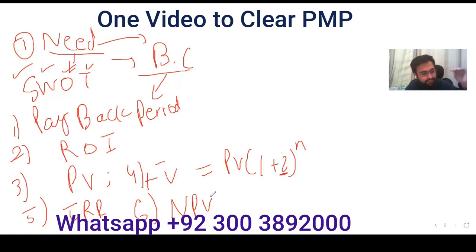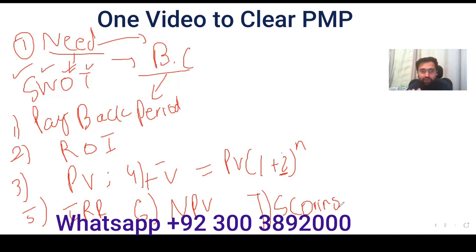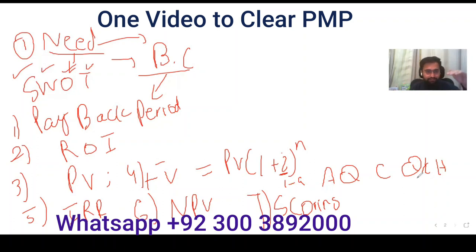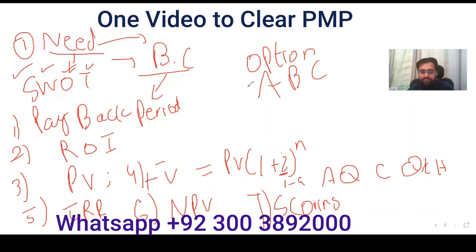These are selection methods for the project listed in the exam content outline. You can also use a scoring model — a multi-criteria matrix. For example, for choosing a dinner venue, your criteria might include food quality, cost-effectiveness, and ambience. You rate each criterion from one to nine, add the points — this is the scoring model. Through all these techniques, you select which of multiple project options to pursue.